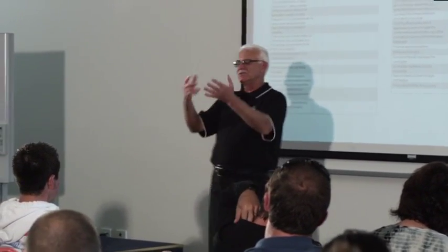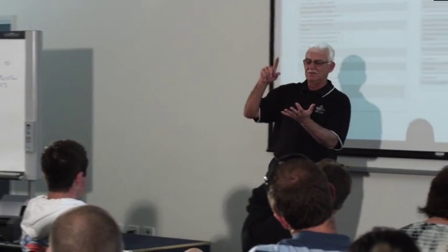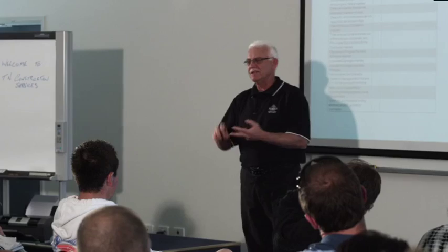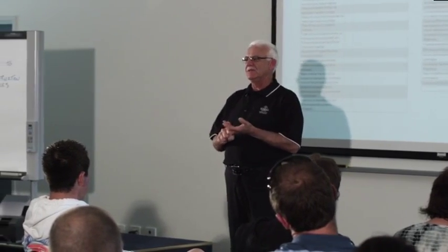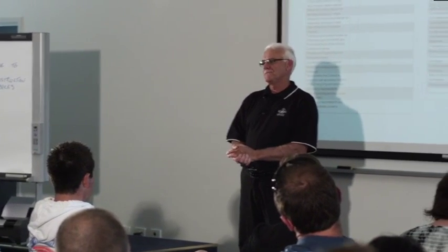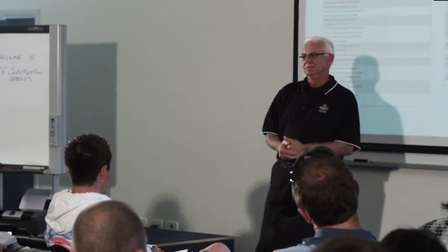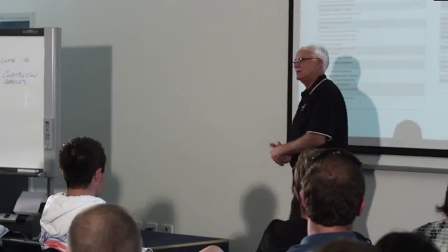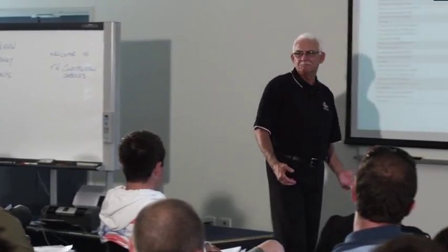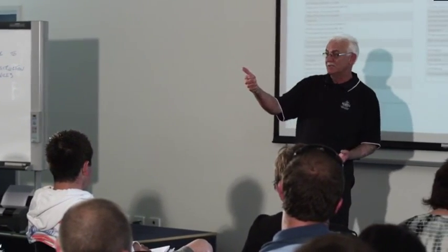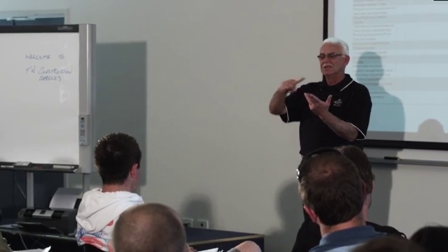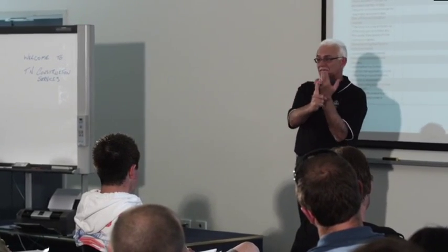So if you're doing a job and you say, I'm going to do it as labour and material, so you work out all your labour, all your material, and then you put your 10% profit on top of it, thinking that you're making 10% at the end of every job. You're not. You're probably actually losing 2% because you've got to pay for all your administration, all your paperwork. So you should have two charges: your labour and your material, then you put your overhead costs on it.